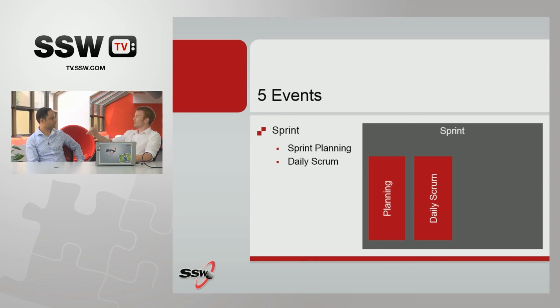It's almost like a show and tell for the product owner, where they're giving a status update. Yesterday, Mr. Product Owner, I did this, and today I've done that. And that's not what it is. Now, I'm not saying don't tell your product owner what's going on, but this daily scrum is not for that. This daily scrum is for the team to just create a plan for the next 24 hours.